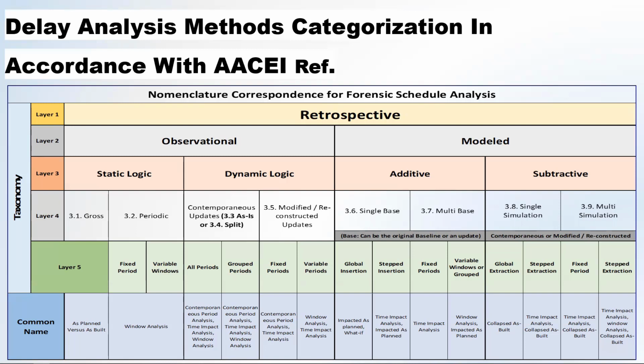But-for means that you will create an as-built schedule, and an as-built schedule in the essence of extension of time is far different from an updated schedule. In terms of project controls, they are the same, but in the essence of extension of time, the baseline schedule is a kind of schedule, the updated schedule is another kind of schedule, and the as-built schedule is a third type of schedule. Anyway, either we add the fragment, so it's classical, or we go for subtracting.